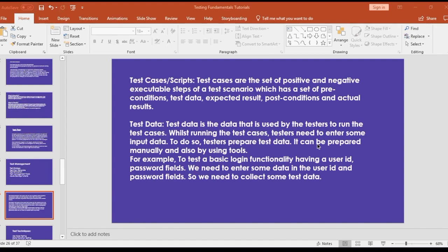So you come every day, you say what you did yesterday, what you intend to do today, and if there are any blockers. So all you talk about is, I tested this, I tested that, there's no blocker, and today I intend to do this. You don't go there discussing the defect, or some people go there to talk about a main issue that everybody needs to brainstorm, but it doesn't usually take more than 10, 15 minutes.